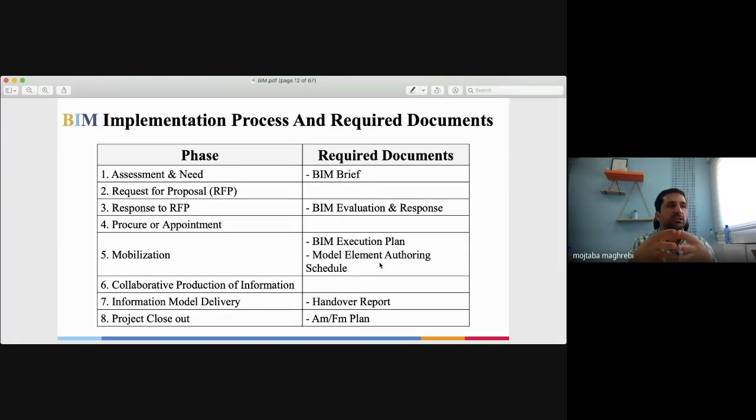In the project scope, we need to say what the projects are, the main goals, the budgets, the carryover budgets, the stakeholders, the challenges, the opportunities for these projects, and how we could change the project scope, and all of those. We have an initial strategy document that they call a scope.